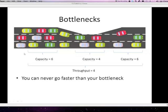We have a capacity of six cars passing here every minute when we have three lanes. But here in the middle, we only have two lanes. And the capacity here is actually just four cars per minute. And after here we have, again, three lanes. So we have a capacity of six cars per minute. But if you look for all over this process, the capacity will be constrained by this capacity here in the middle. So the actual throughput or capacity of the whole process would just be four cars per minute.